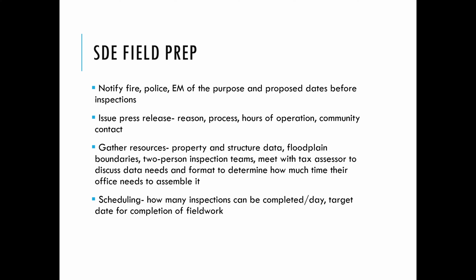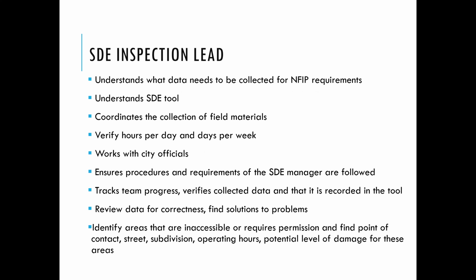And then again, how many inspections do we have to do by each team? How many can be done in one day? So how many days it's going to take, and then a target date for the completion of that field work, and then hopefully a target date for the completion of your determinations. So basically, you would need to understand what data needs to be collected for NFIP requirements, understand the tool if you're going to use that. So there's no requirement to use this software, but it's just something that FEMA put together to assist communities in putting together consistent assessments.